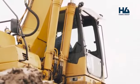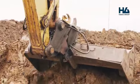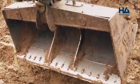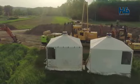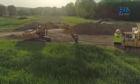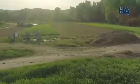After the trench is filled with the soil resulted from the digging, the vegetation layer is restored, with the land deposited separately after scraping, the surface returning to the initial state. The pipeline thread thus assembled, executed according to the entire set of operations, is to achieve the connection of the Bibeș station with that of Jupa. The completion date of the pipeline segment from the second and third lots is estimated for March 2020.